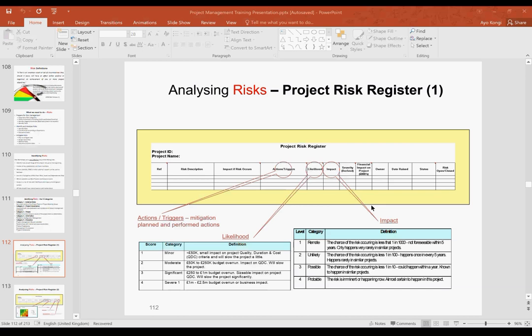Okay, who are we going to give as the owner of this particular task? The project manager? Can you be the owner of this risk list? So as a PMO person, don't leave meetings. I'll say this again. The moment you are in a meeting and someone identifies a risk, don't leave that meeting without asking who is the risk owner. If you're a project manager, quickly assign that risk to someone, and boom.